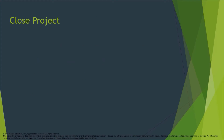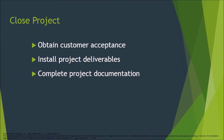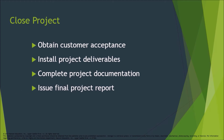Close the project: Obtain customer acceptance, install project deliverables, complete project documentation, issue the final project report, and celebrate.